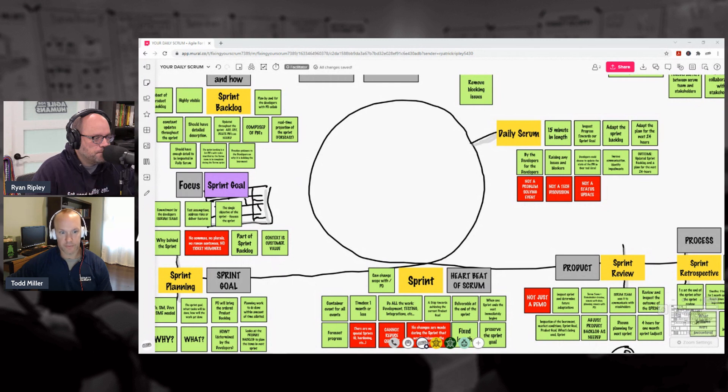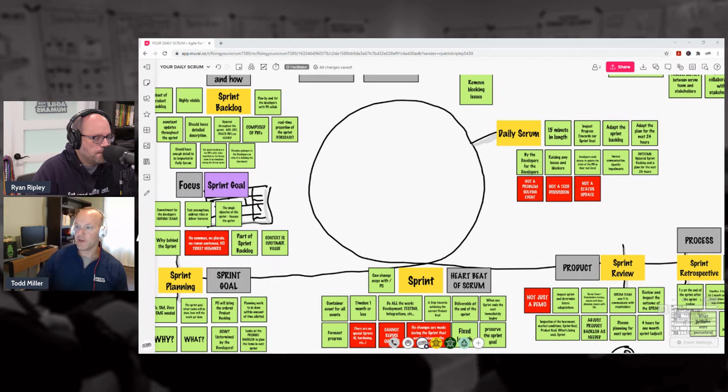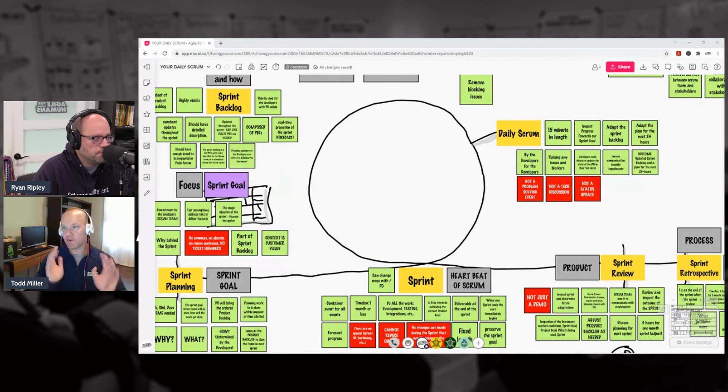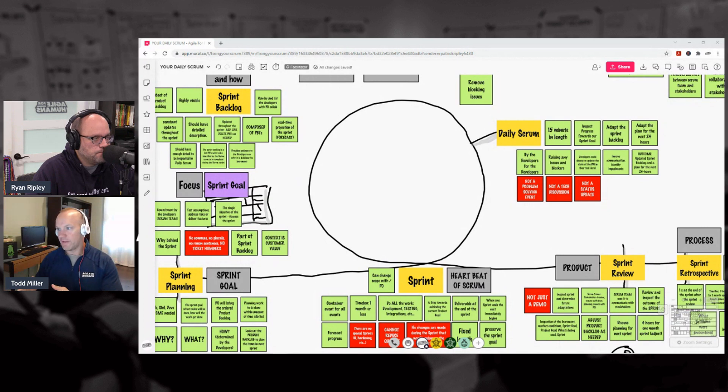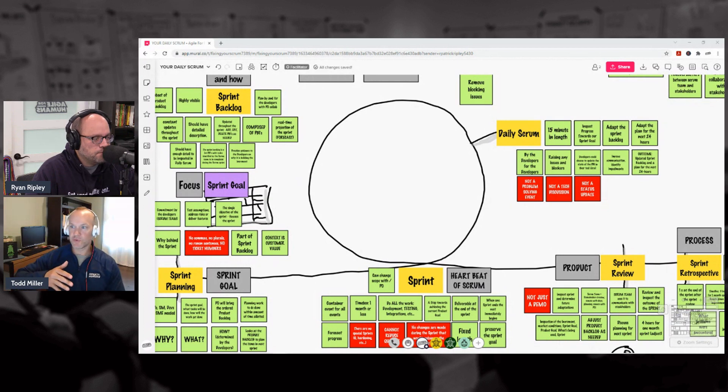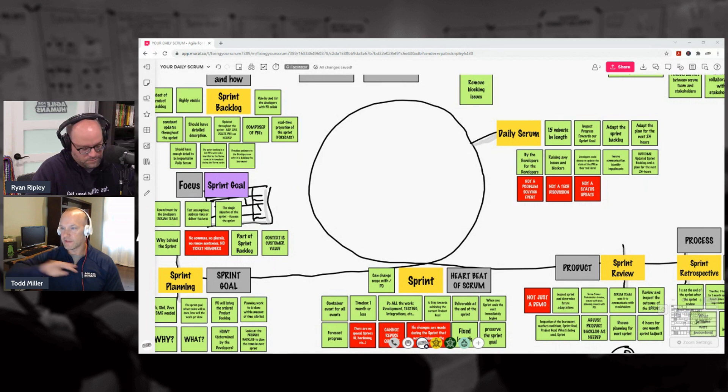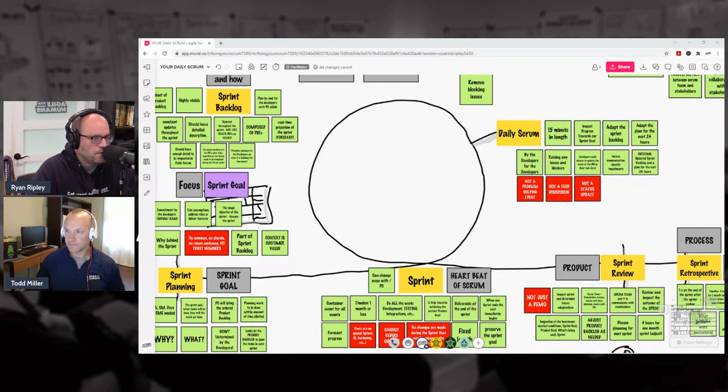Great, I think that—so what I'm, can I rehash? Sprint Planning's first, the Daily Scrum happens every day after, and then at the end or towards the very very end of the sprint we have the Sprint Review. So that is the order.